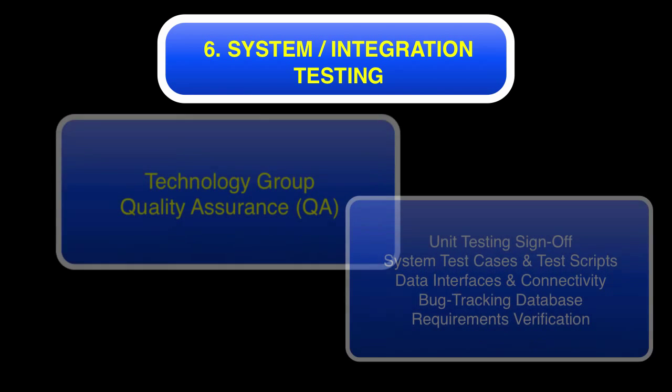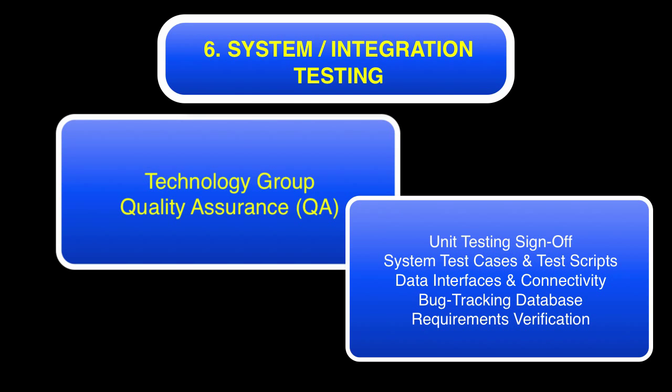That leads into the system or integration testing section. The QA team will complete and sign off on unit testing before integrated testing starts. They're also going to create a full integration test plan, which they should have started during unit testing. They'll make sure that all data interfaces and connectivity are set up, and that all the systems are speaking to each other properly. All bugs get entered into the bug tracking database. And finally, requirements verification — by the end of integration testing, the QA team has to verify that every requirement is working properly. That's really critical.